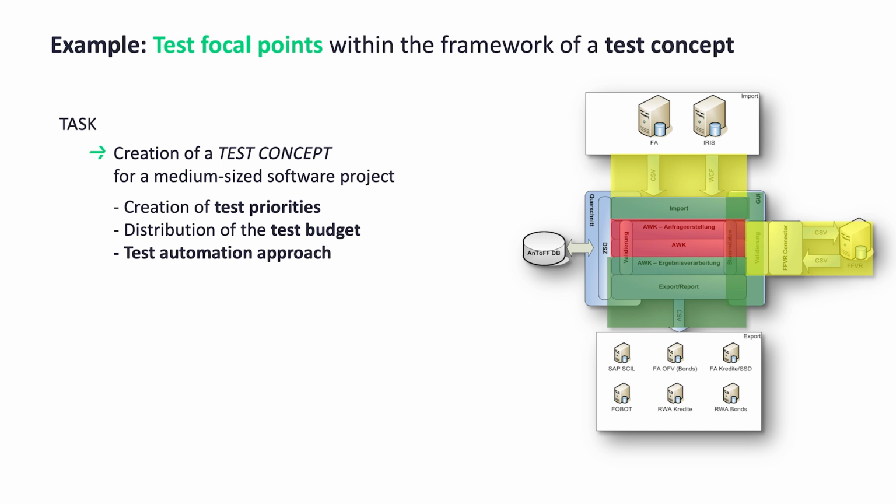However, if a risk-based test approach had been used, the predecessor project would also have had to come to this conclusion without knowledge of the history, because a portfolio evaluation system that calculates incorrect evaluations causes maximum loss. The level of loss caused by errors in the set of rules is therefore very high. Because the dependencies make the rules complex and error-prone, there is also a high likelihood that errors are lurking here.